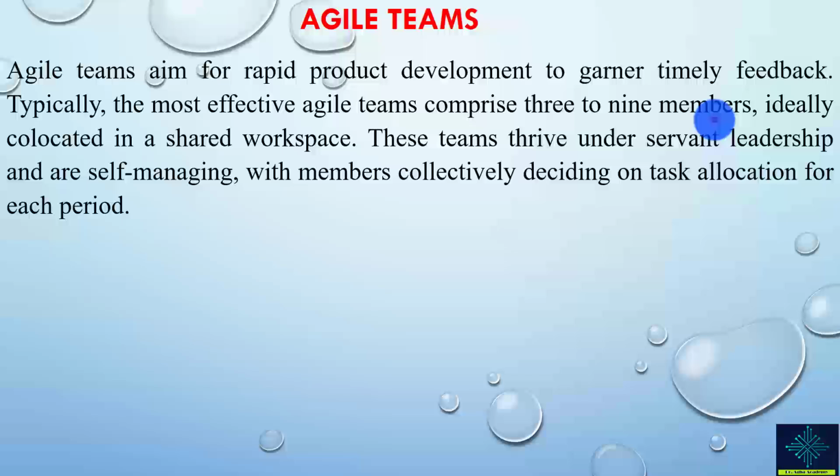Sometimes, if needed, we can assign a bit more, but usually it should be less than 10. In some situations, you might see 12 team members, but usually you have 3 to 9 as the ideal situation. And they are ideally collocated in a shared workspace.